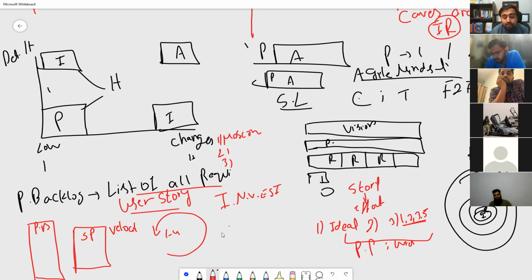Once that is done, at the sprint end you have a sprint review in which you show what you have made. The user story is checked according to your checklist, the definition of done, that is called a checklist, the must-be-done things. Once you have completed the user story, you present it to the stakeholders, who have their own acceptance criteria. They check it, and the acceptance criteria is just like what was written on the user stories.